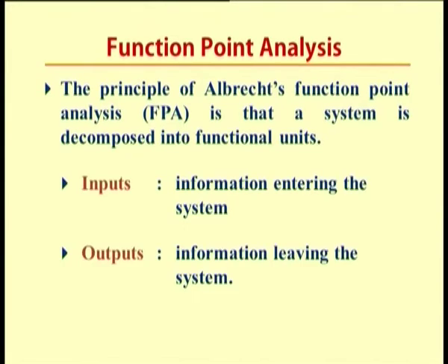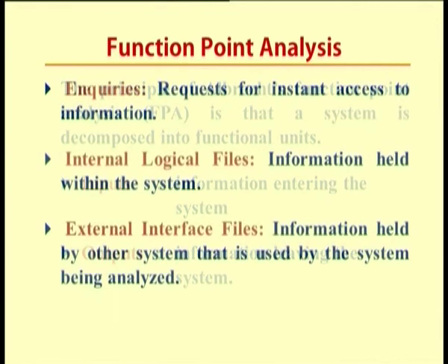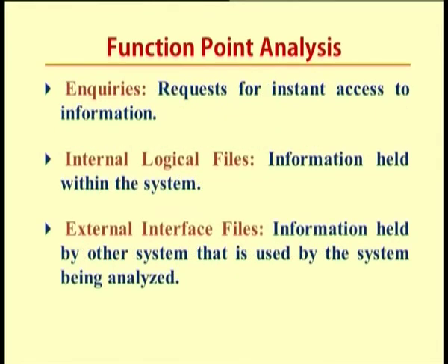Whatever might be its size, what we need to understand is we need to study the functionality involved with that kind of work. So the principle behind Albrecht's function point analysis is that a system is decomposed into 5 functional units. One is the input, where information is entered; output, information leaving the system; enquiry, request for instant access to information; internal logical files, information held within the system; and external interface files, information held by other systems that is used by the system that is being analyzed.